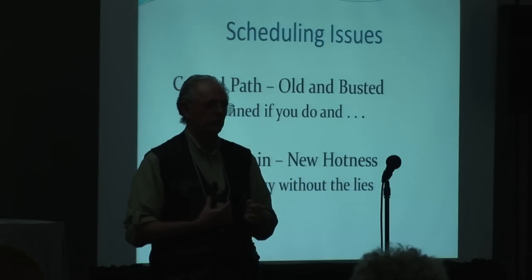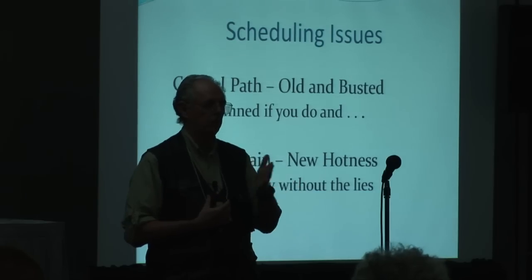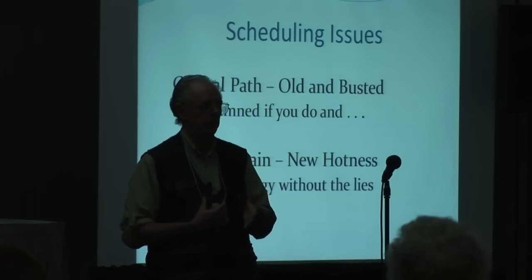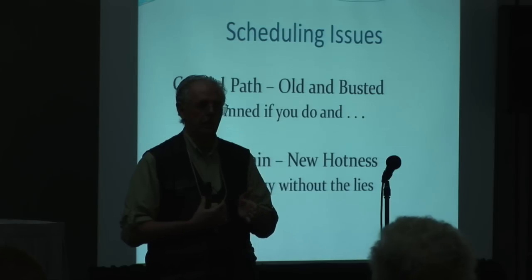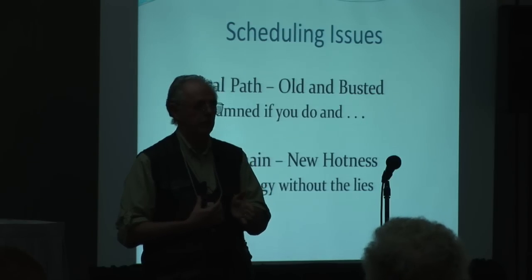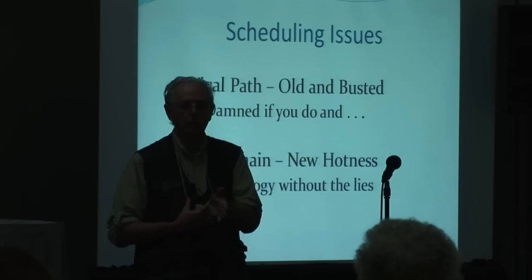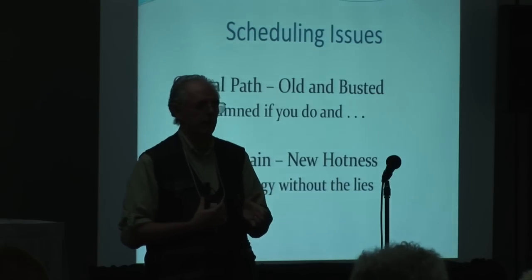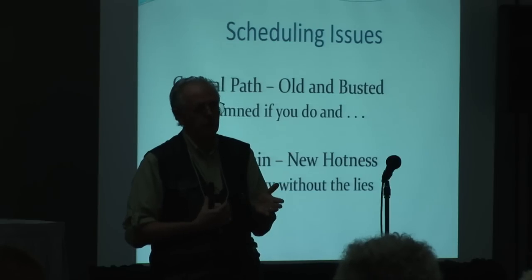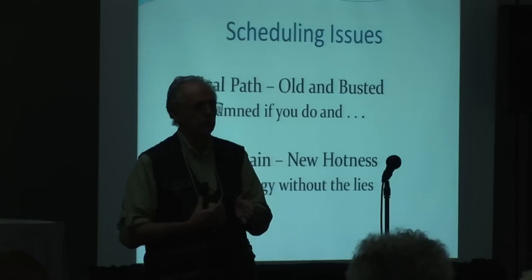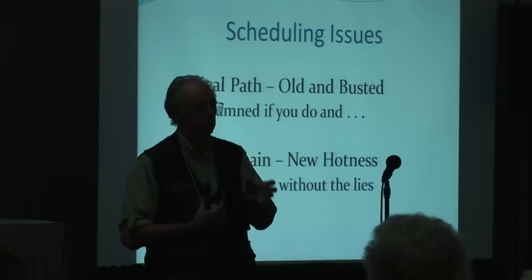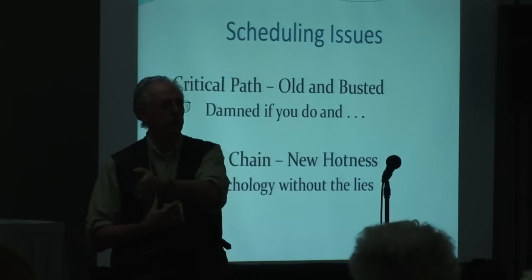The trouble is, there is a psychological disadvantage when you put in that pad, even if the person who is doing the task is the one that gave you the estimate and they put in the pad. If it's a 2-day job and they've given themselves 4 days, at the end of 2 days, if they're almost done and they've got some things they can do to clean it up, they will continue working because they've got 4 days. And what typically happens is pretty soon you run into a task that you figured would take 2 days, you estimated 4 days, but it really takes 6 days because you ran into a problem you hadn't anticipated, and wham, your schedule is busted, and you don't make the schedule because it's in the critical path.